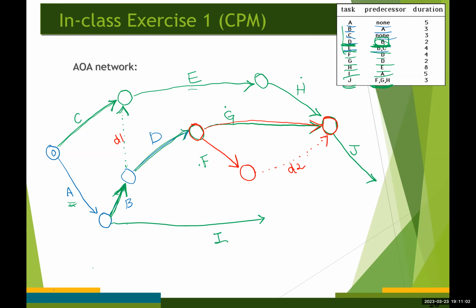Also, the project is considered completed when all of the activities are completed, so make sure that the finish node is included in your network diagram. I'm going to include the finish node here and then make a connection to it.